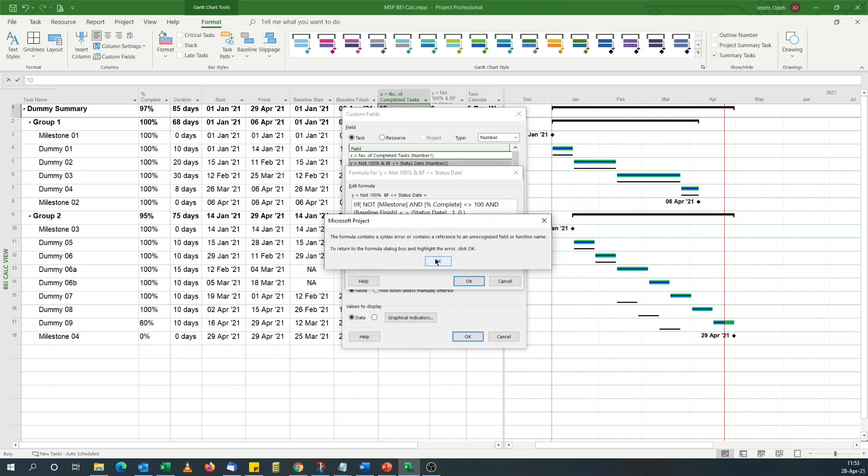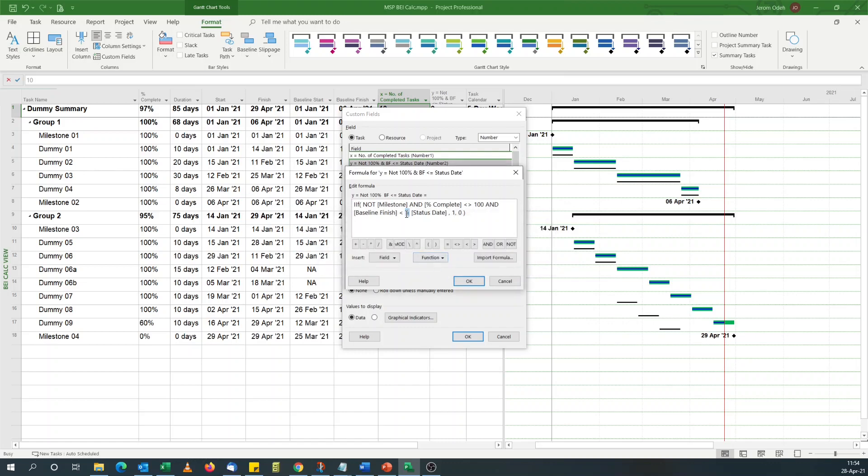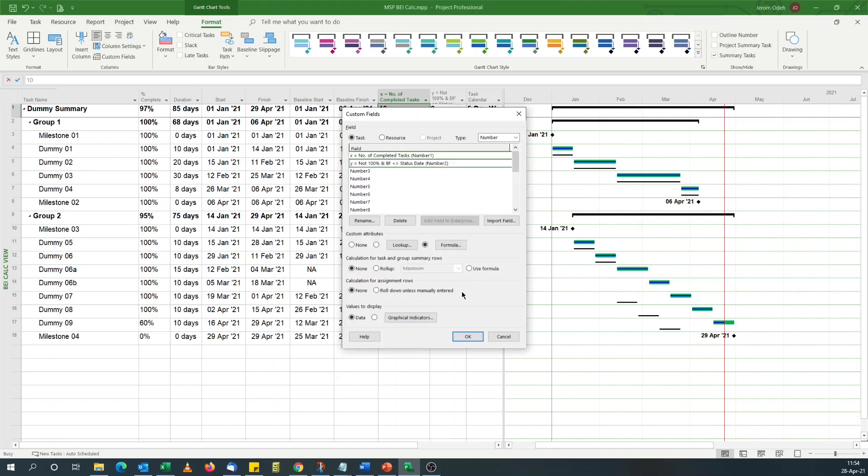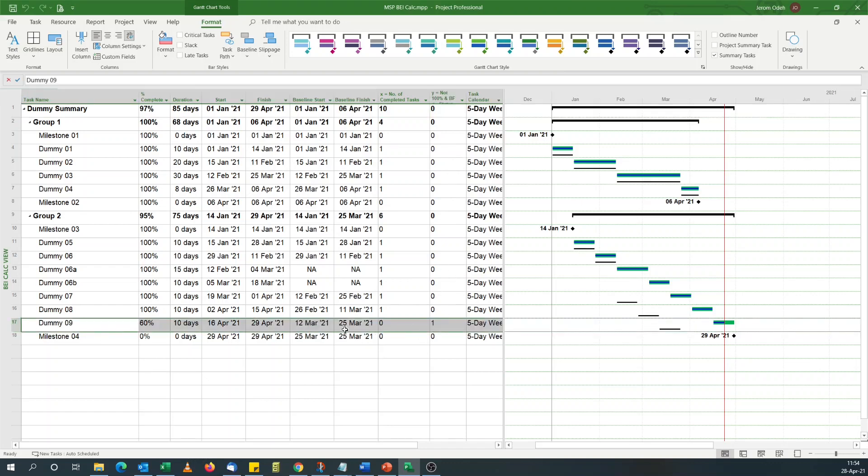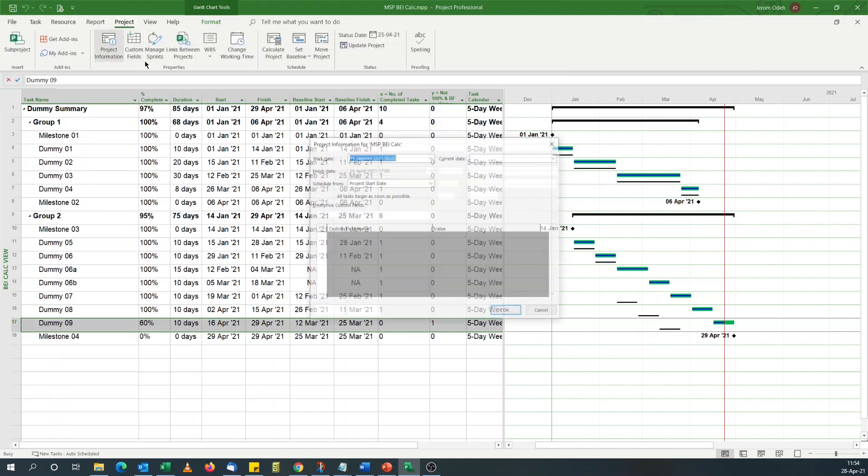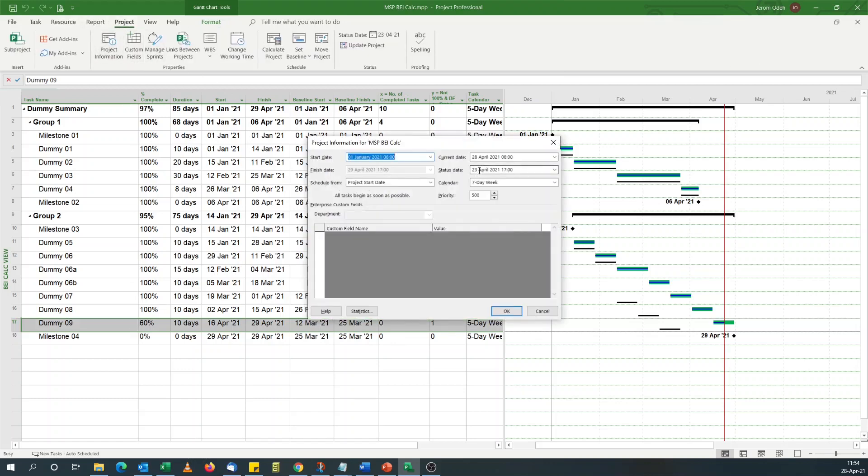The formula contains a syntax error. Okay. Now, as expected, everything is zero except for this task, which is not 100% complete and the baseline finish date is in the past. I can show you my status date is the end of the 23rd of April.